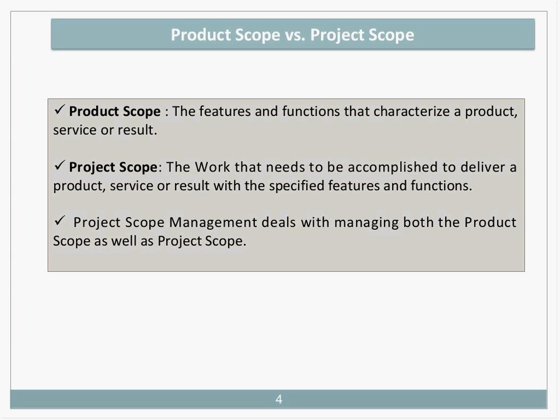Between the product and the project scope, the project scope is not necessarily completed when the product scope is completed. For instance, the project is not yet completed until the project closure has been completed. The product scope is normally completed before project closure.